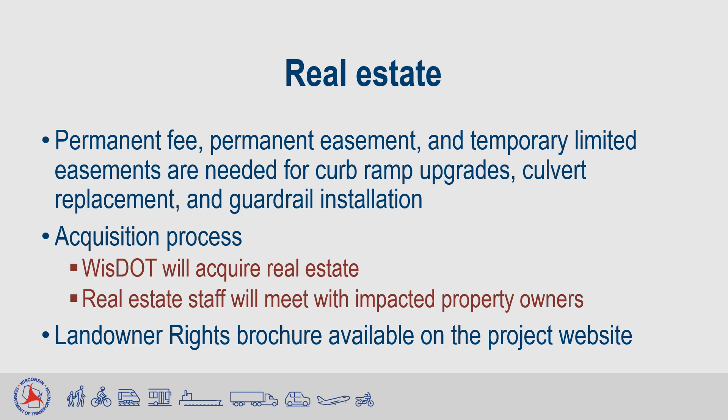As mentioned at the public involvement meeting in July, some permanent right-of-way and some temporary easements will be required for the reconstruction of the East Main Street, Oak Hill Drive, and Wisconsin 16 intersection to a single-lane roundabout. WisDOT will acquire the real estate and real estate staff will meet with impacted property owners. Additionally, a landowner's rights brochure can be found on the project website.